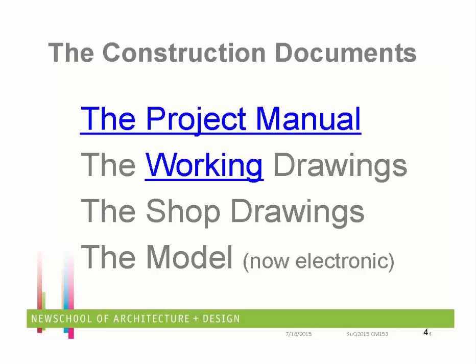So in the project manual, it'll say, Raymond, you're the reinforcing steel contractor. I need from you 6 complete sets of shop fabrication details, 6 complete erection plans, and a list of how many pounds of material you're going to deliver in each lift so that we can work our lifting capacities.